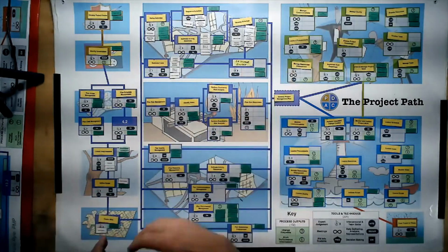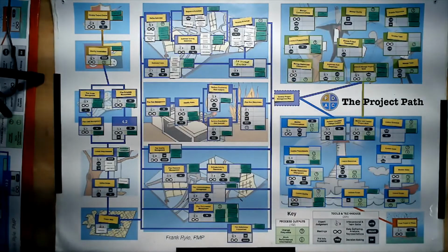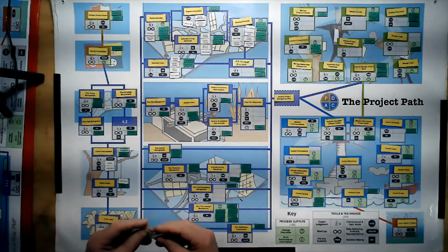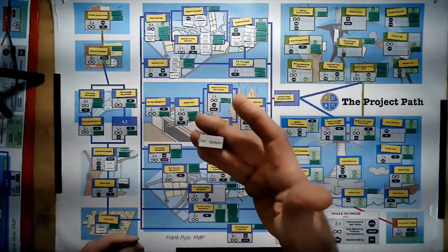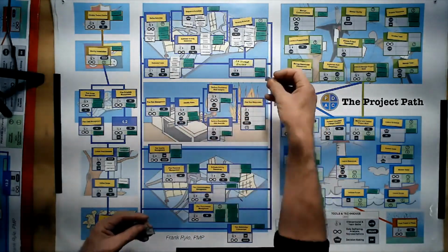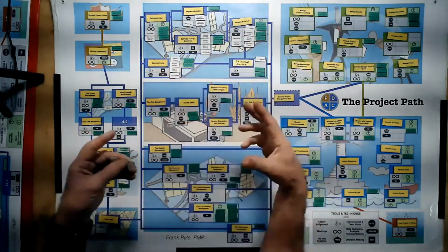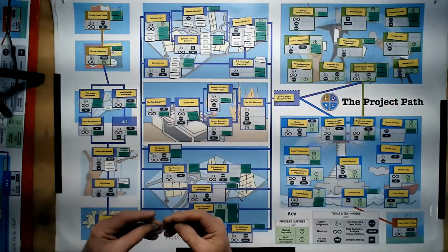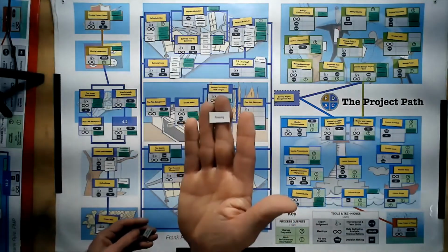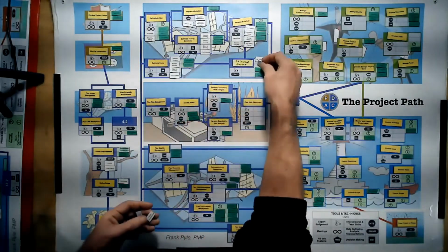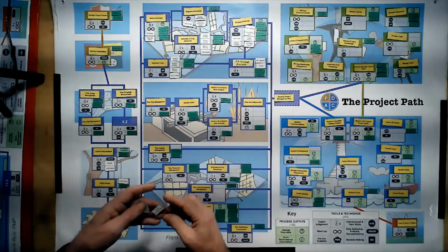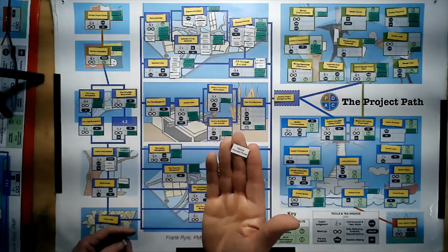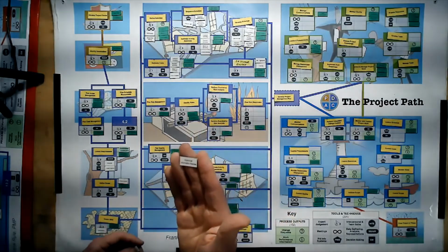And now we can see that determine the budget is something that we can do, and we have some things to help us. Okay, so let's have a look and see what's here. Cost aggregation. So cost aggregation is how we take all of the costs and we group them together over a timeline, and we produce an S-curve or something to represent it. Financing will also help us. What financing is available to us? What financing do we need? And of course, that's particularly on large construction projects, perhaps. Most organizations will finance it themselves.